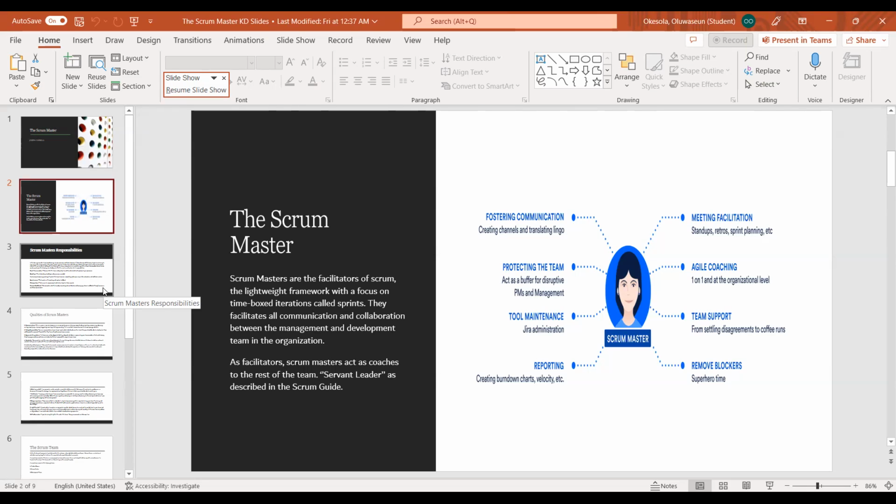All right. Thank you very much for your question. So to start with, as a Scrum team, we don't work in silos. A Scrum team works as a Scrum team. So it is the responsibility of the Scrum Master to identify the capacity of everyone on the team. Over time, you know what every individual on the team can do. Usually this situation might not occur within the Scrum team because we established that the Scrum team collaboratively commits to what they can deliver. There is a metric called story point, right? During sprint planning, everyone sits down and we collaboratively commit to what we want to achieve in story points. So when we speak with one voice, it is difficult for just one person to say, all of a sudden, I cannot do this, or I cannot work on this again.